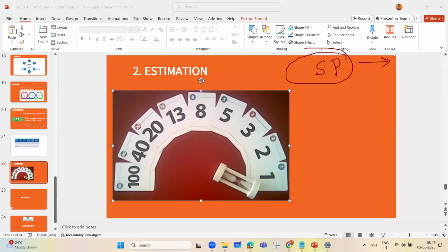your one user story says that I want to log in as an unregistered user, using mobile number and OTP, so that successfully I can get into the UI of Fly Agile Airlines. Okay, this is one of the user stories. Now you will identify on the complexity basis how much minimum story points you are going to give. And every time, story pointing is given in the Fibonacci series.